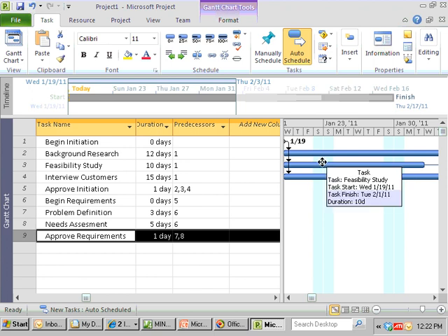Even though it's going through the weekends, it doesn't count those days because this built-in calendar thinks the weekends aren't work days. Now there are ways, if, God darn it, we're working 7 days a week, you can make that. So realize while it's spanning this, the work days turned out to be 3 in this week, 5 in that week, 2 in that week to make the 10. But here's the thing, we don't have to calculate all of that. Realize that the project manager software is doing it for us.